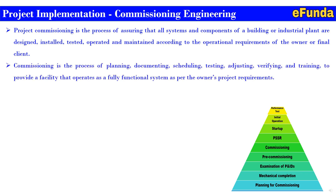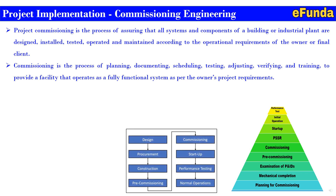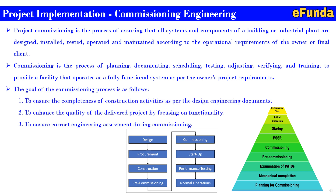Commissioning is the process of planning, documenting, scheduling, testing, adjusting, verifying, and training to provide a facility that operates as a fully functional system as per the owner's project requirements. The process involves design, procurement, construction, re-commissioning, commissioning, startup, performance testing, and normal operation. The goals of commissioning are: first, to ensure completeness of construction activities as per design engineering documents; second, to enhance quality by focusing on functionality; third, to ensure correct engineering assessment during commissioning.